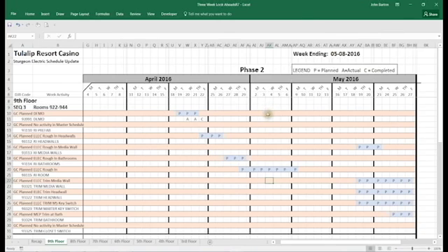And if they are, don't hesitate to put it in. If you think you're having to do some demo over here, just put an A right there, because you charge time to it. Obviously, if you're charging time, make sure you put an A right here. And that goes for 2 hours, 5 hours, or 8 hours, right? If you're doing anything, we want to know that you did something there, because that will help the team overall to be able to say, look, I'm moving my guys around 3 times a day just to get anything done around here.